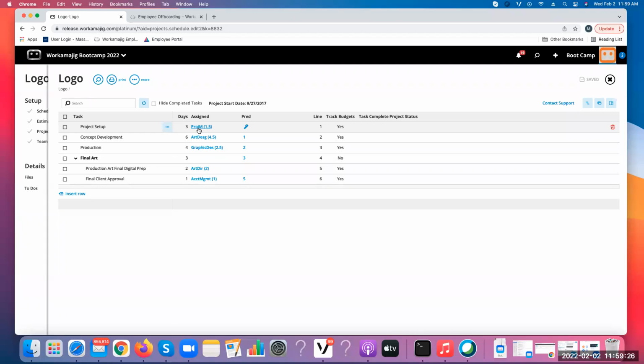We have people that leave. And if every time somebody leaves and they were in a role that's on every template, well, now I have to update every single template I have in this system. So you can avoid that if you do everything by service. And then it's always quick and easy.